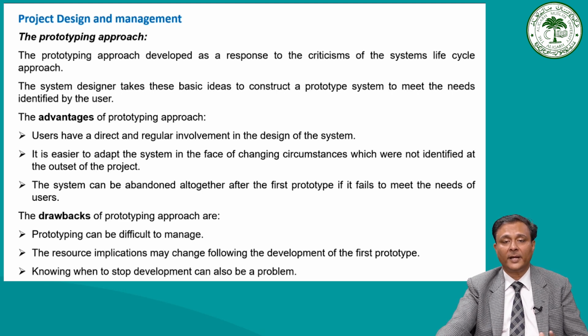However, there are some drawbacks also of this approach. If I can identify some of them, they are, for example, prototyping can be difficult to manage. There may be a large number of users. So with a large number of ideas and opinions, it would be difficult. The resource implication may change following the development of the first prototype. So then it may also create some situation which may not be very feasible to incorporate in the middle of the project.